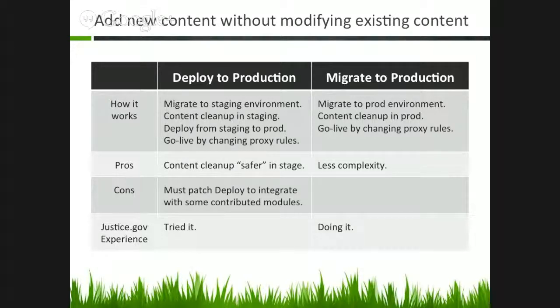The benefit of doing it this way is that it's a little bit safer to do this sort of content cleanup in a stage environment, mostly because the content managers, this is their first time using Drupal often, and they may have gone through training, but they're still a little green and may make mistakes that affect other people. So if you really want to be sure that that doesn't happen, you can do this content cleanup in a non-production environment.